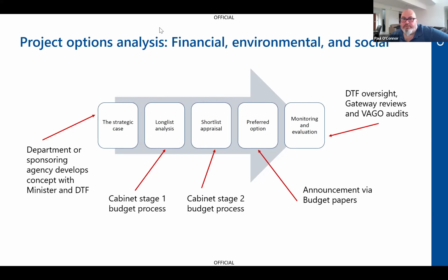And from the long list, there will be quite a reduction in the proposals, and that becomes the short list. And that's known as Cabinet Stage 2. Usually by stage 2, they have a much better understanding of their financial position because they've collected 6 months worth of revenues, and they can work out what they can afford. And there is potential maybe for something that was knocked out in round 1 could get reintroduced in round 2 if there's funding.